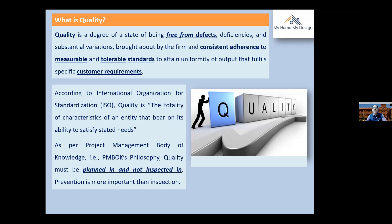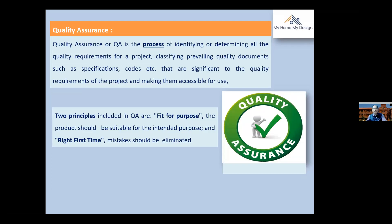Quality assurance is the process of identifying all the quality requirements of a project, classifying prevailing quality documents such as specifications and codes that are significant to the quality requirements, and making them accessible for use. That means quality assurance gives the customer assurance right from the beginning — this is our SOP, these are our records, this is our specification, and as per IS codes, this is what we are going to do.